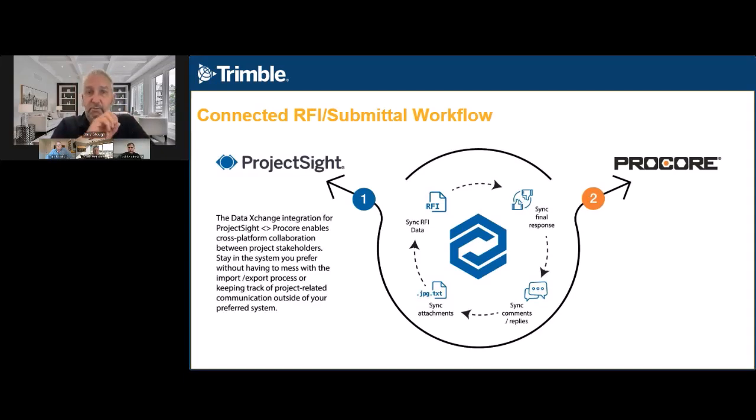The integration adds that new RFI or submittal over in Procore. You're able to collaborate on it and have a transfer of answers, comments, and attachments sync back into each system. So it took all those steps, 10 steps I think it was, and it turned it into 1 each.